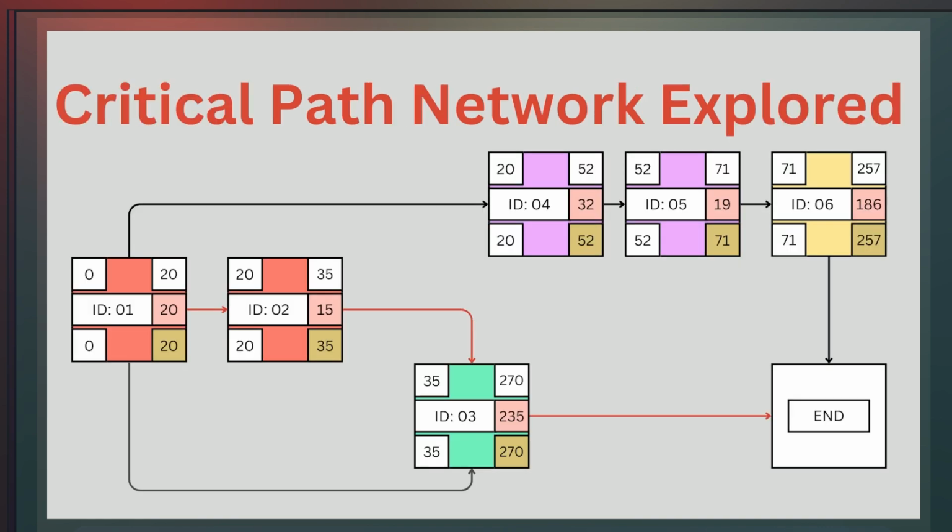The critical path method (CPM) is a technique used to identify the longest sequence of dependent tasks in a project, a sequence that ultimately determines the shortest possible completion time. A critical path has zero slack, meaning delaying any of its tasks will directly delay the overall project. However, non-critical tasks can have slack, which provides flexibility to adjust schedules without affecting the final completion date.